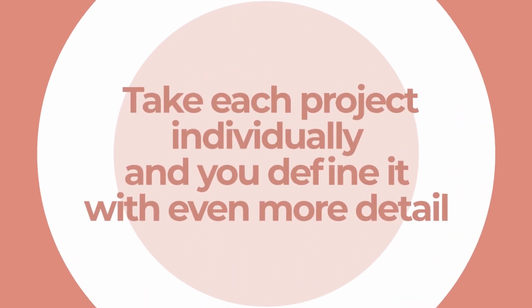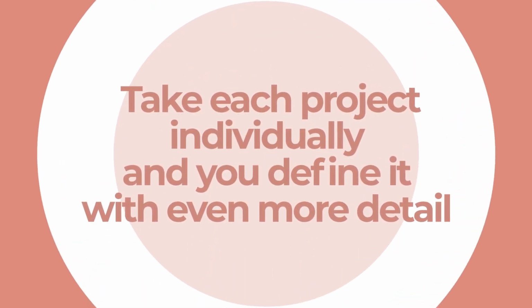If you can map all the projects that you have right now on one calendar, you're able to manage your workflow with so much more leadership. The second piece of this, number 2, after you create your Maplendar or Gantt chart, what you do is you take each project individually and you define it with even more detail. And then you show that to the client. And the important part of that is that you get your client to enroll themselves into your leadership with that time management of their project.